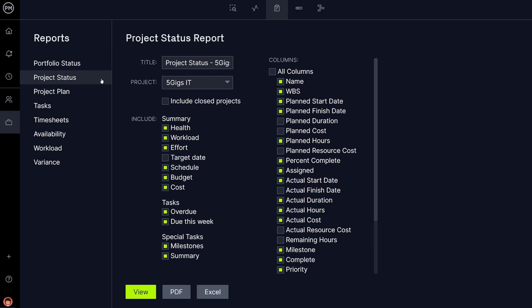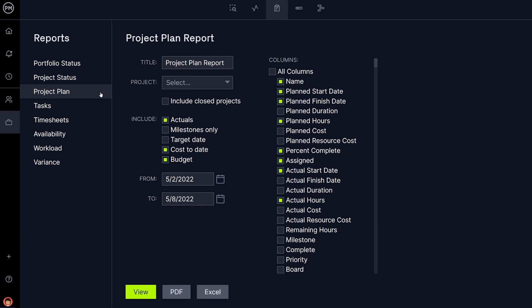The Project Status Report, while similar, focuses on a single project. The Project Plan Report is also an overview of a single project. Instead of grouping tasks by status, however, the Project Plan Report shows tasks in relation to the work breakdown structure.